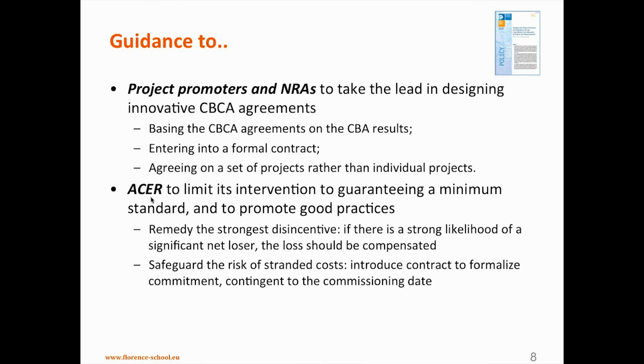Regarding contract, it could be good that Acer already safeguards the risk of stranded costs, so that there is a contract that is contingent to the commissioning date. For instance, if Acer would decide one country has to compensate the other, that compensation could then be contingent to the commissioning date, so that in the case of Norway and Sweden, if Sweden is sticking to its agreement to speed up but doesn't reach the agreed commissioning date, the compensation is reduced.